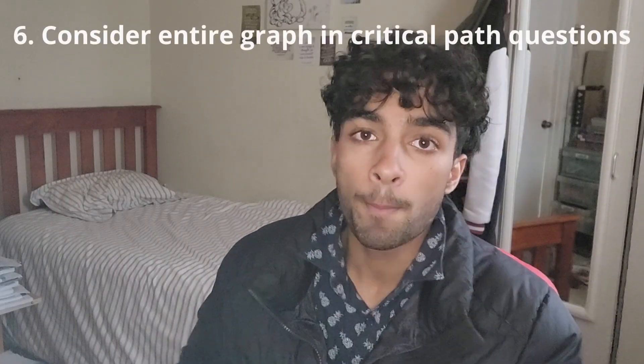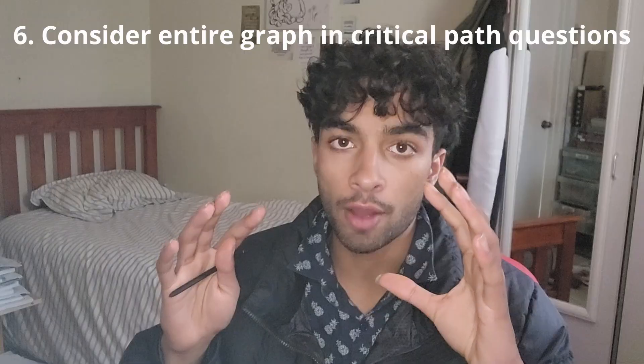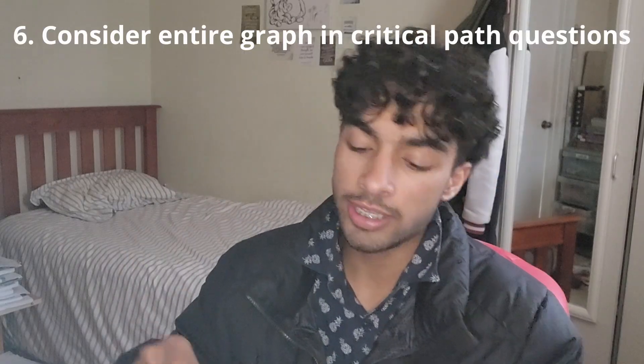Now in critical path questions, where you're looking at LSTs, ESTs, float times, all those things, make sure you consider the entire graph together. Because in these critical path and activity questions, you have to look at the entire graph. Otherwise, you may miss out on some small details that could either make the float time even longer or shorter. So consider all the pathways that could be occurring.